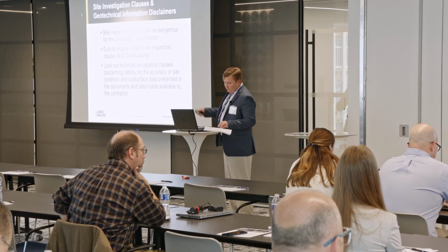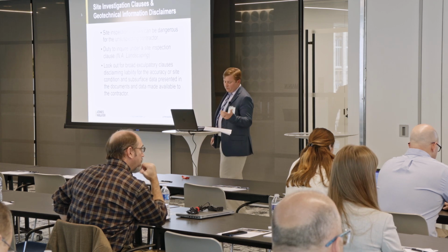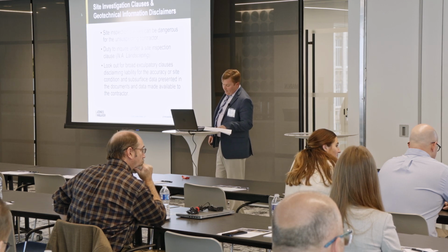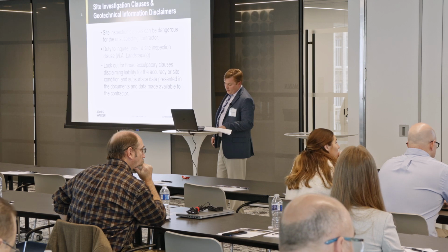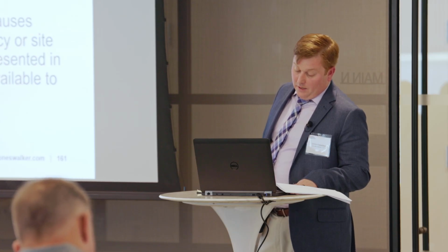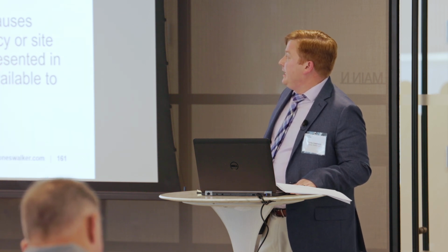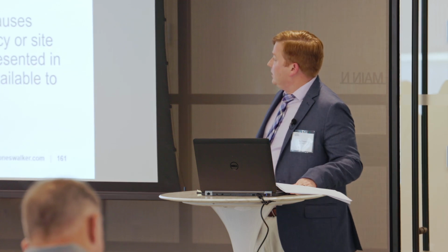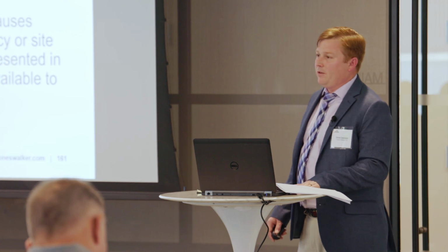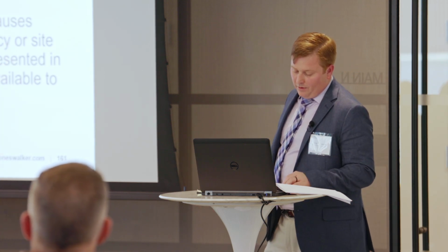So jump back, I think there was a case on an earlier slide, North American Landscape, and it was a dredging contract with the Corps for a creek in Virginia. And the court here analyzed a site inspection clause and found that basically the site inspection clause created a duty for this contractor to conduct a site inspection, and in here it was to determine the amount of barge traffic that was going to interfere with this project, which was on the river.